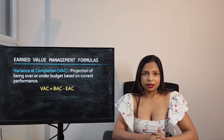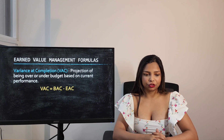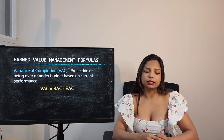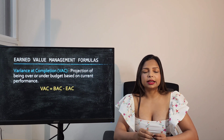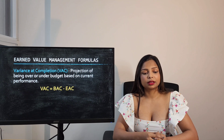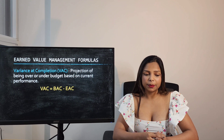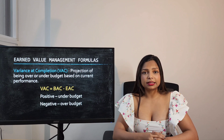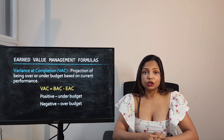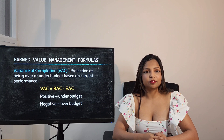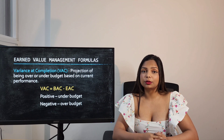Variance at Completion, or VAC, shows the projection of being over or under budget based on the current performance of the project. The formula is Budget at Completion minus Estimate at Completion. A positive value means your project is under budget; a negative value means the project is over budget.